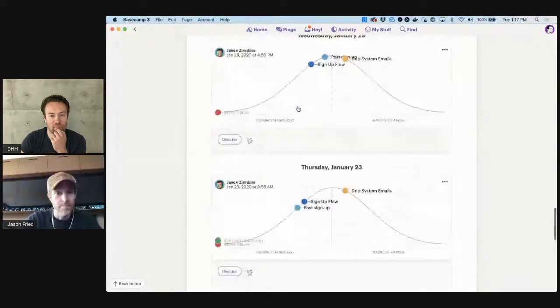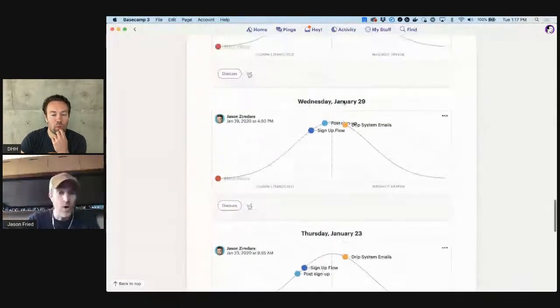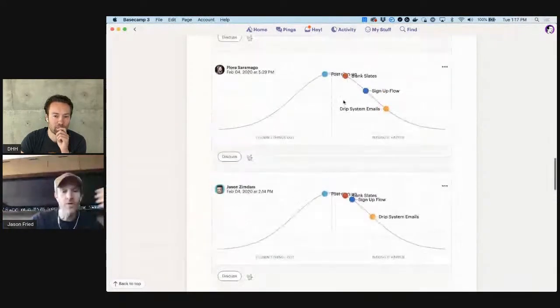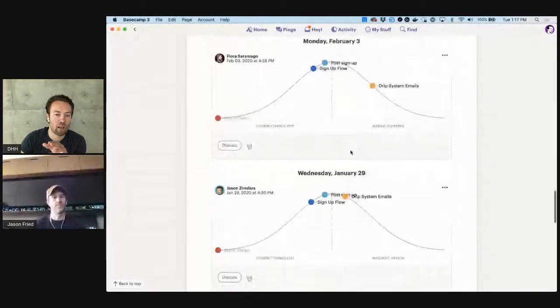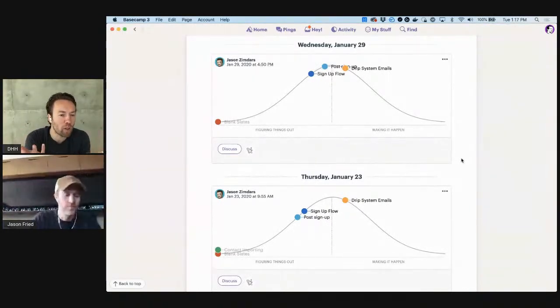Okay. And a few days later, they updated the chart again, some more movement, and so on. And so what you can see is one of the characteristics of dots or to-do lists that are in the figuring out phase is that you're still adding to-do items on the list. You might start that list early on the uphill. It has like 3 items because you don't really know what the work is. You start working on it. You start making something and you realize, oh, I'm going to need this. I'm going to need this. I'm going to need this. Then by the time you reach the top of the hill, the list is relatively complete.